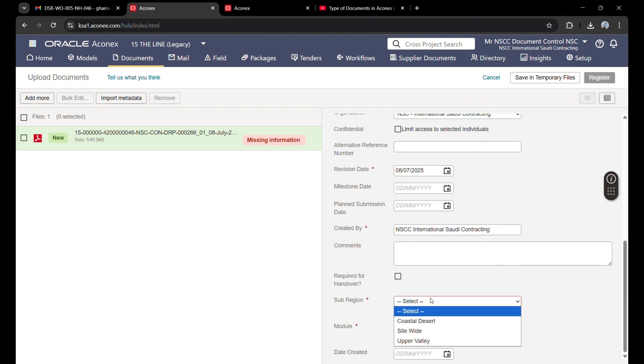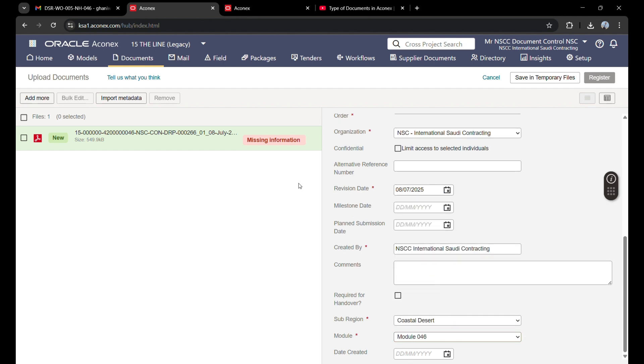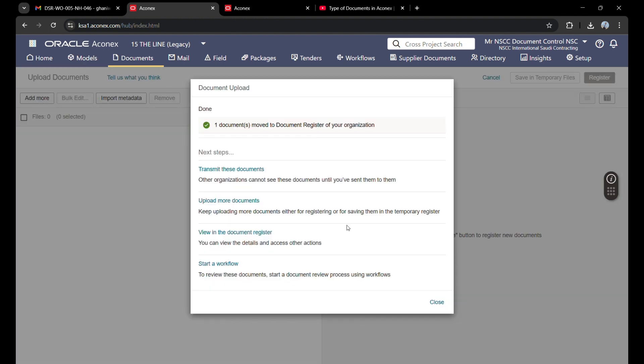The sub-region is Postal Desert, module is 46. Now this is ready for register. Before, it was showing missing information because all the required fields were not filled. Now it is ready. I will click register, then the file will be registered. I will click 'View document in the register.'